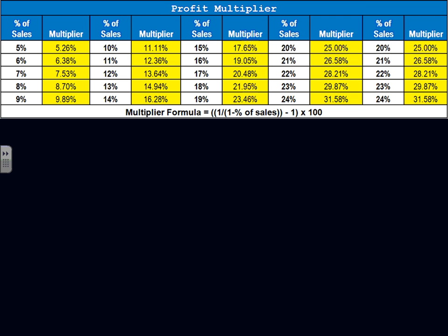Here's how they do it. Take this. If you want to have 10% sale, so let me pick on Andrew. Andrew, if your job is $1,000, the selling price of the project, the bid price is $1,000, and you want to make 10% on it, 10% of 1,000 is $100, right? You need to get $100 out of this $1,000 as a profit. Cool? That's percentage of sales price. In order to get this, you have to go to the break even and multiply it not by 10. You're going to multiply by the multiplier, which is 11.11%.